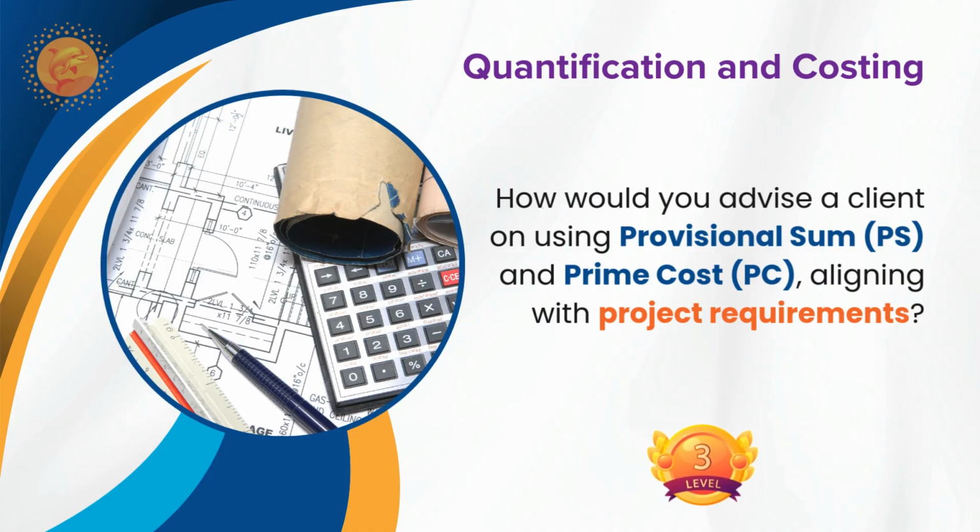In the Middle East, for wooden doors we use prime cost, but for the whole item, including the workmanship. Kitchen cupboards and bathroom fittings also come as prime cost, including installation, not only material. Some of the items we use including installation. Yes, that is well and good. Thank you for both.